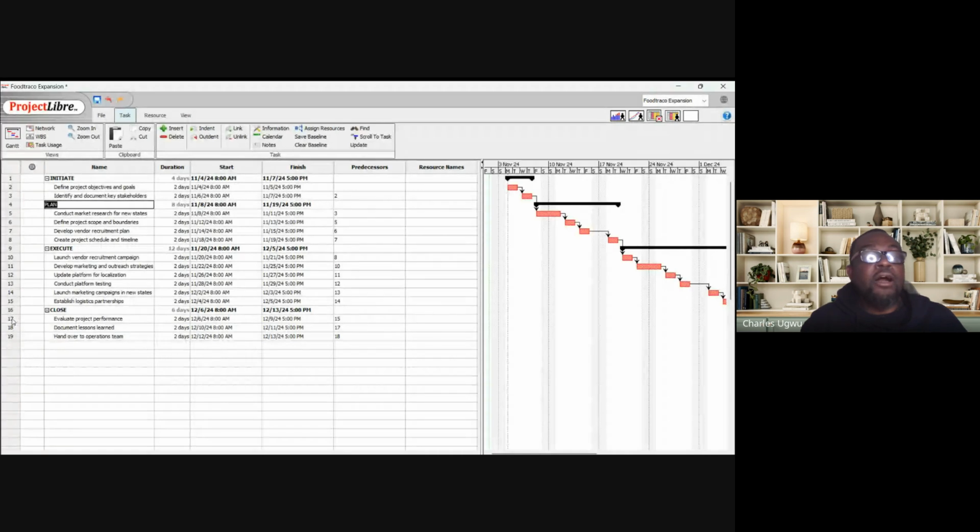Look at number 17 here. We didn't capture number 16 as the predecessor. We have to jump 16 and come over here and capture number 15. And that's why you see here, number 15 is the predecessor to number 17. We have to jump 16 because 16 is a stage, not a task.